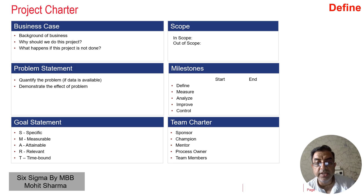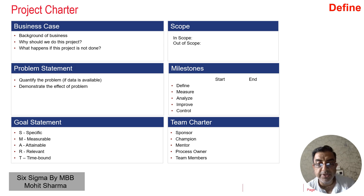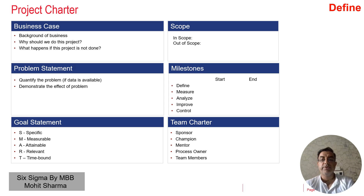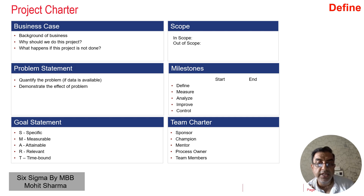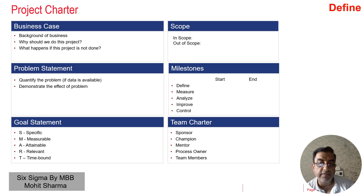The next important element in the project charter is to define the team. You have to define who is the sponsor, who is the champion, who is the mentor, who are the process owners, and who are the team members. The sponsor is the person who has the problem and gives it to the champion to solve. Sponsors are generally senior people in the organization and should also have the authority to approve any costs that arise.